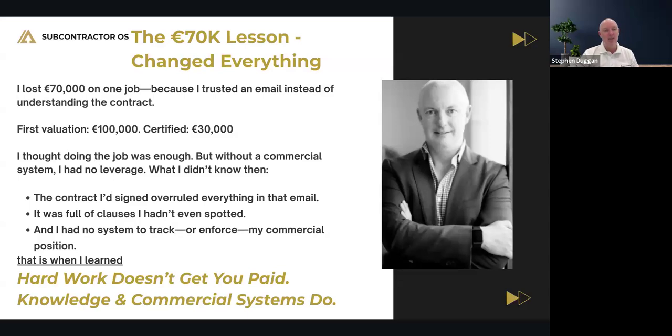So the main foreman convinced me to set out the building while I was waiting for the metalwork. And stupidly, instead of putting in a dayworks claim, I agreed that we would get an enhanced percentage complete on the first valuation.